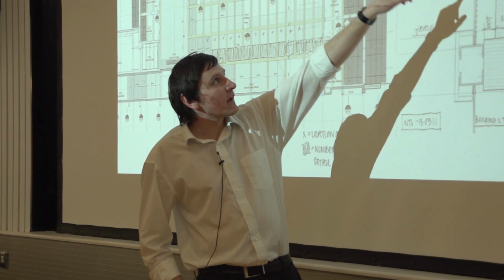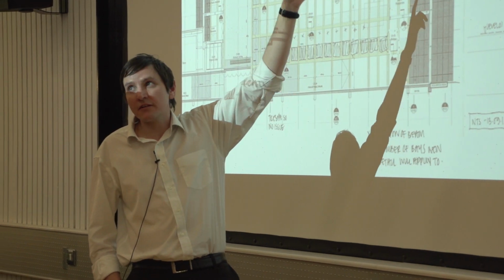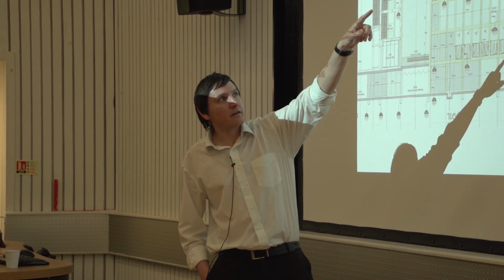So what we've done is, where the beam's there, we've raised it up to form the barrier load, and then downspecced the glass to save the money on the loading that it would have had to be designed for to stop you being able to push it out, and then introduced cladding around it.